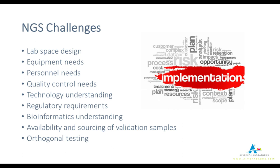As Jeff mentioned, every laboratory is going to have some struggles and challenges when they bring in any type of new testing — and NGS is certainly no exception. Our first undertaking was: where are we going to put it? With sequencing, you're worried about contamination and ensuring good laboratory practices, isolating an area designated as clean. We had to put some time into where we were going to move current instrumentation and how to place the new instrumentation coming in. We also needed to consider the equipment needed — PCR-based versus capture-based technology, which makes a difference in what we decided to bring in and how it fits in the available space.